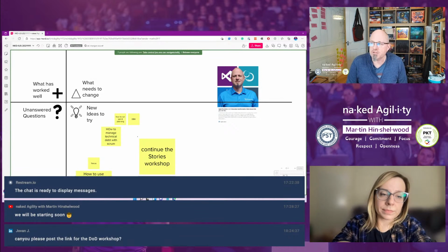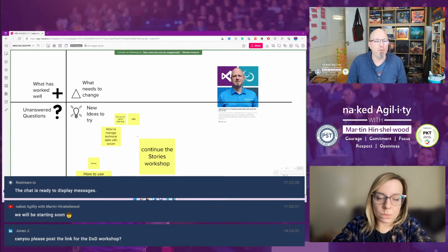So I don't want to have that assumption, but having a place where I can see all of the user tickets and then break them down into things that go on my backlog, I'm pretty good with that. But I definitely don't want a one-to-one relationship, because one user ticket might turn into 5 backlog items, or various things. Maybe, I don't know. What are you doing just now?